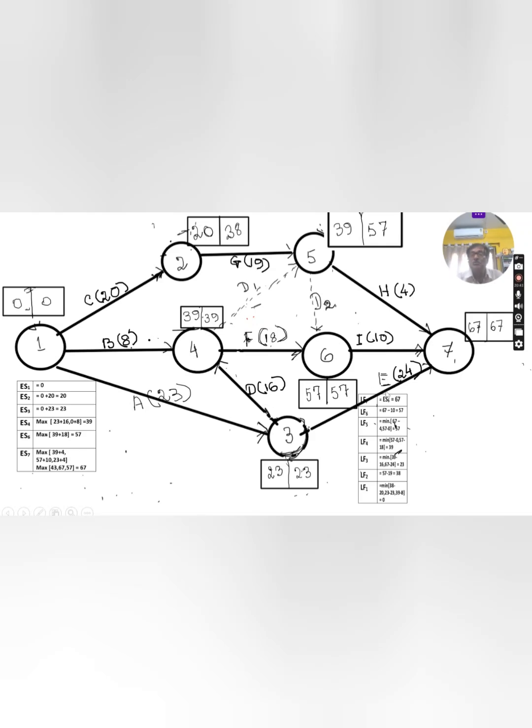So of the two, keep the lowest, that is 23. It is shown here. You can check it. Latest finish time 3 is 23. How you have computed it? 67 minus 24, 39 minus 16. Keep whichever is lower. That is latest finish time 23.